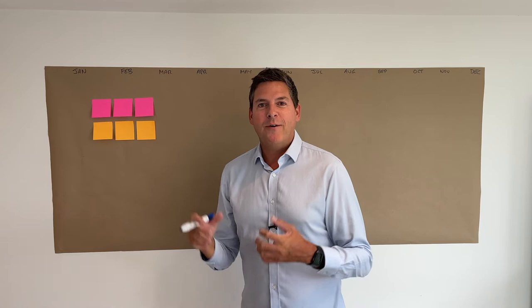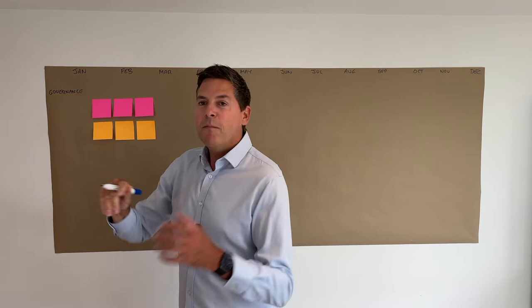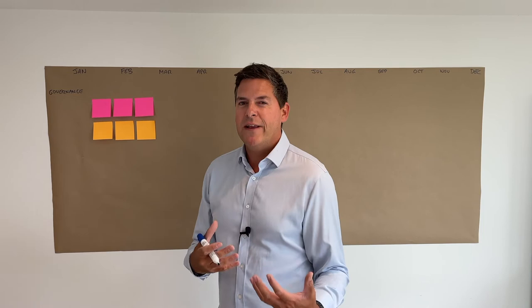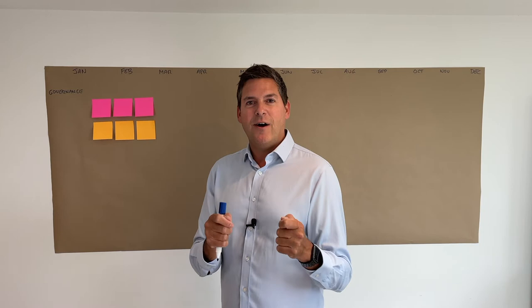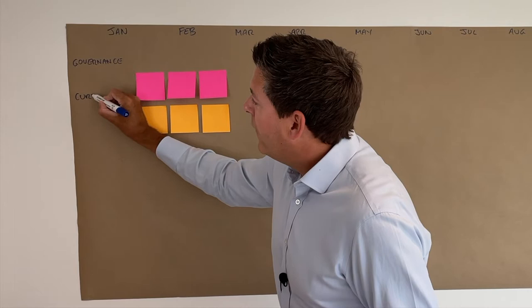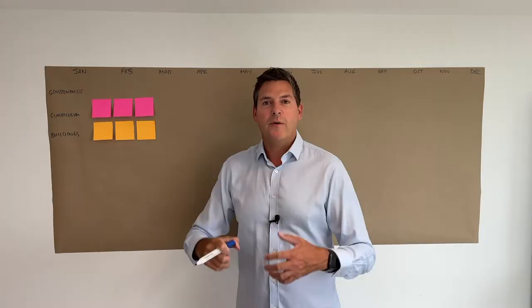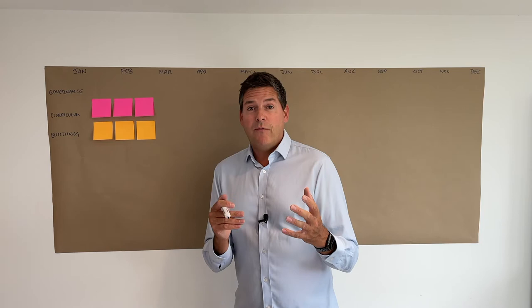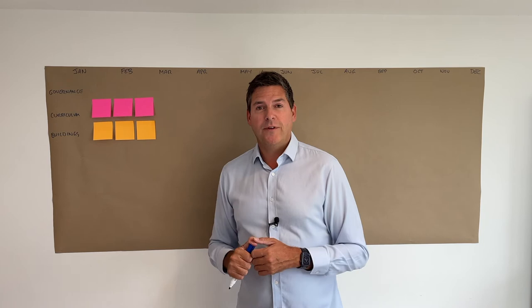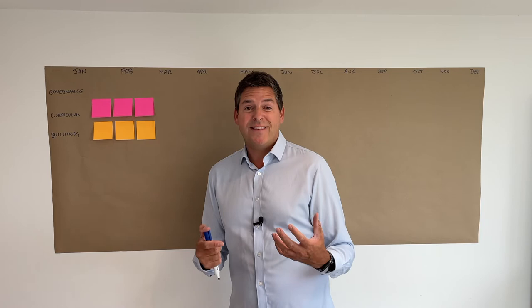With the timeline on the wall, we can begin the session. For work streams, let's pick some — we said governance, curriculum, and buildings. You might want to start on a separate area or on post-its because things might move around before you really get into the planning. The most important part is to just get started — get some stuff on your paper so you've got anchor points to work with. It's really helpful at the very start to think about what are those anchor points that are fixed in time.